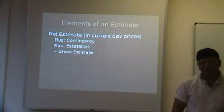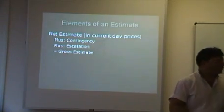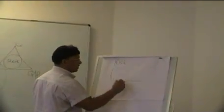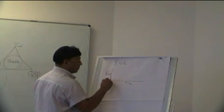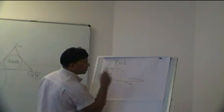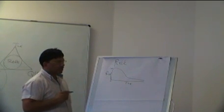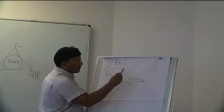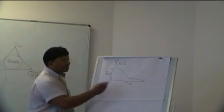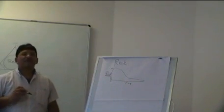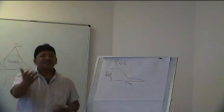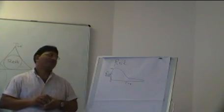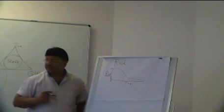Why do you need a contingency there? Contingency is there for your risk on your project because there's always risk on your project. Risk will always be inherent. If you look on the graph, as you move over time, and that's your risk from 0 to 100%, the risk is always high and always goes low to the end of the project. Always progressively elaborated as well. Because of the requirements being so limited in the beginning, the risk is high. So you have to put a contingency amount in there for the simple reason to cover for project risk and also to cover for any items not defined in the scope of work or for anything that happens downstream on the project that was not planned for.